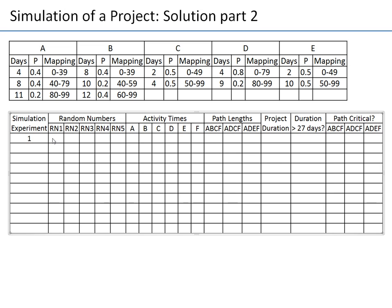For experiment 1, using five random numbers from Excel: 57 for A maps to 8 days; 14 for B maps to 8 days (shortest time for B); 76 for C maps to 4 days; 45 for D maps to 4 days; 89 for E maps to 10 days. F always takes 5 days.